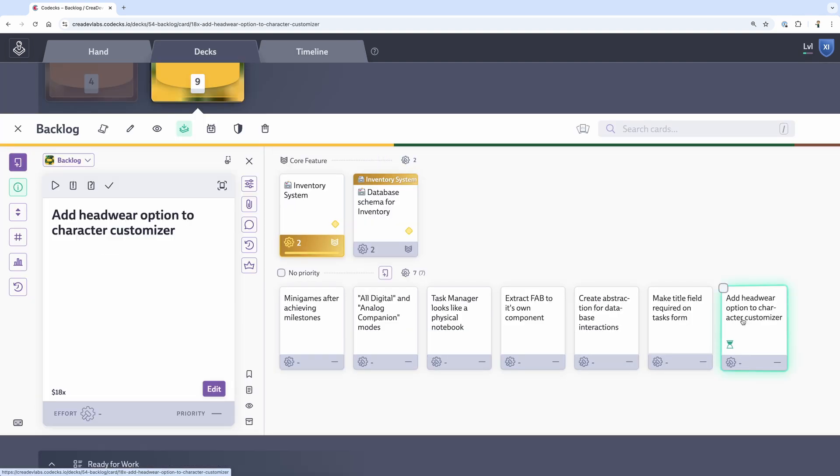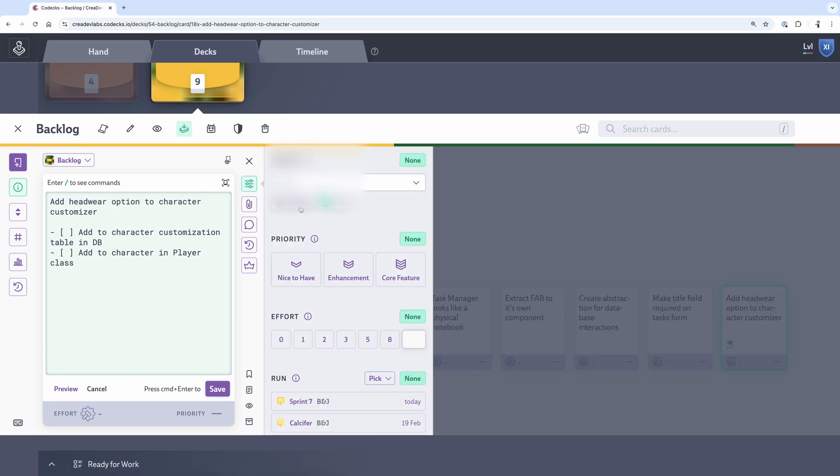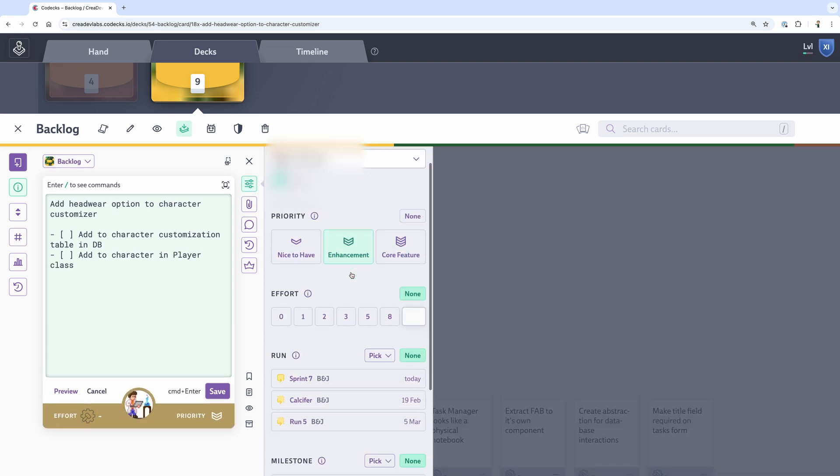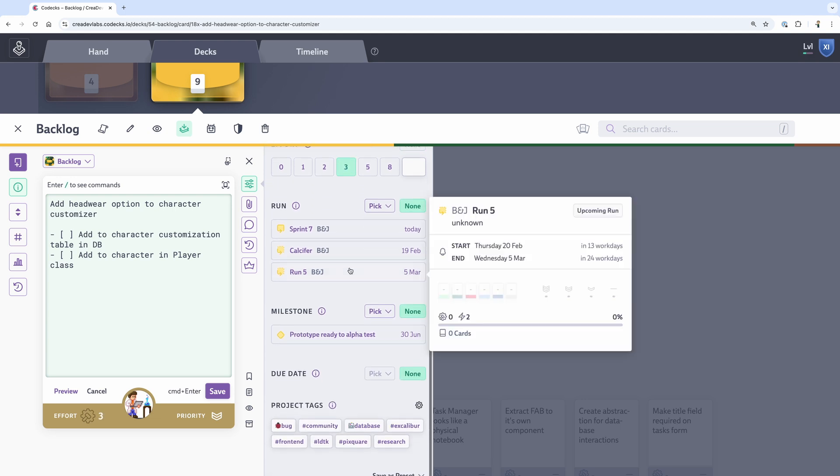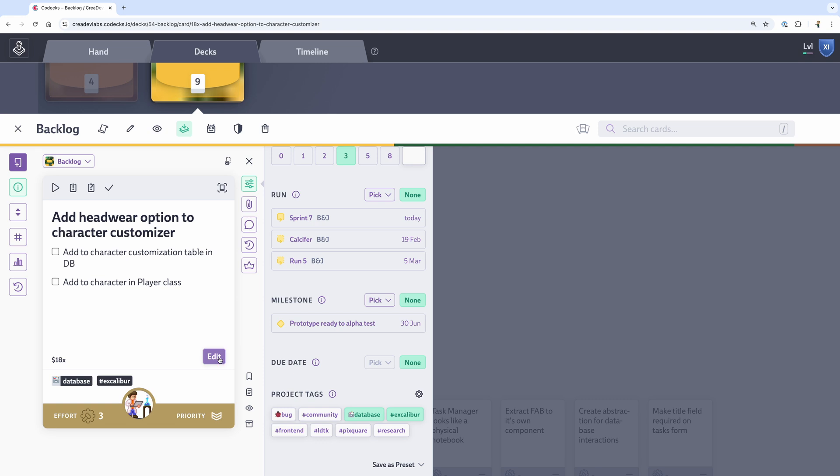Another meeting you often have in Agile is a backlog refinement. This is the meeting where you go through each of the items in the backlog and add details and ask questions about each task so that you know exactly what needs to get done in order to accomplish that task. I do this on a regular basis. I go through my backlog deck and add details and properties to the card so that I know exactly what I need to do in order to get that task done.